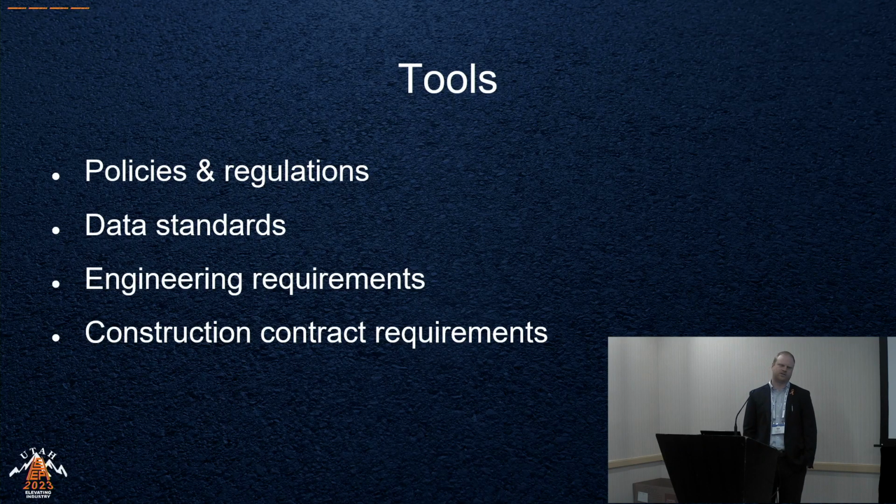The second bullet here is data standards. What that means to me is we had to work through many, many meetings, Richard, Ricardo, and I, and the team, on what our feature codes look like. We want what our contractors are shooting in the field to be able to go into the digital environment and be spit out into a data repository. Right now at TxDOT, we've probably got 5 or 6 different versions of that feature code class that our consultants are using. We need to have one central feature code class that they're using out on the right of way.